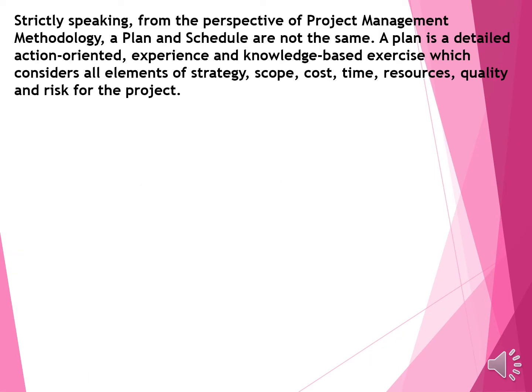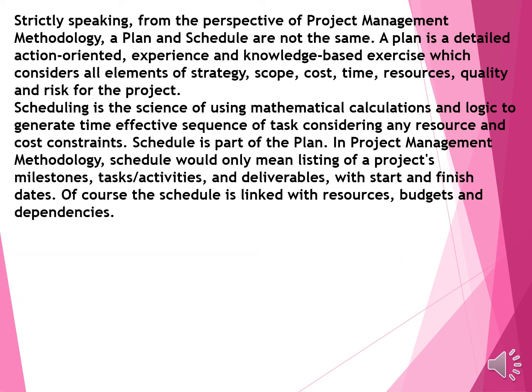Strictly speaking, from the perspective of the project management methodology, a plan and schedule are not the same. A plan is a detailed, action-oriented, experience and knowledge-based exercise which considers all elements of strategy, scope, cost, time, resources, quality, and risk for the project. Scheduling is a science of using mathematical calculation and logic to generate time-effective sequences of tasks considering any resources and cost constraints. Schedule is a part of the plan.